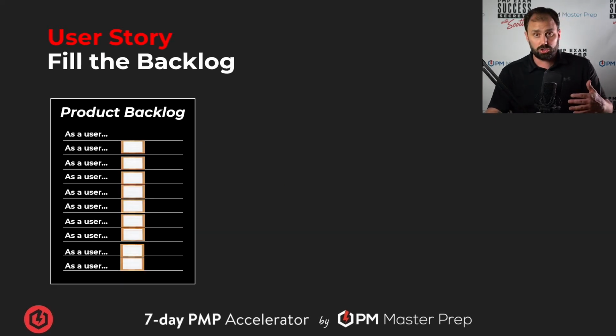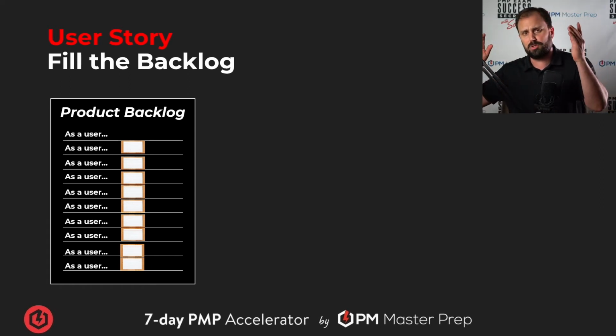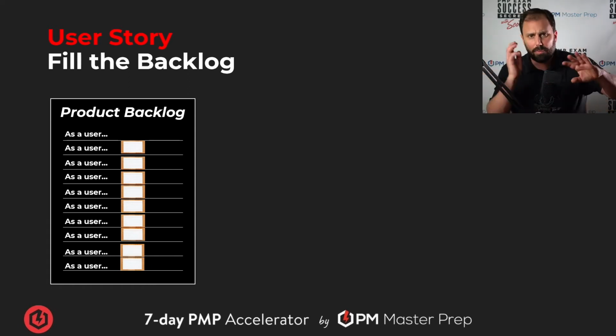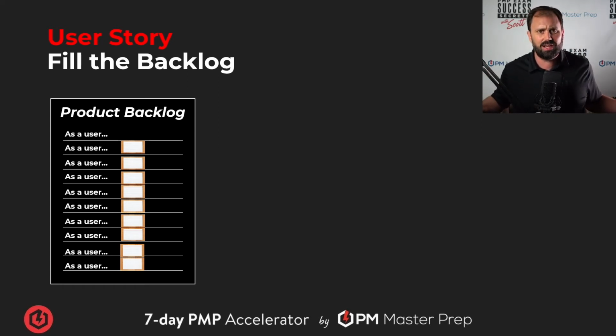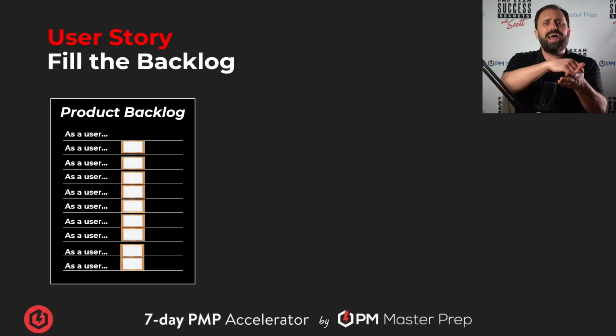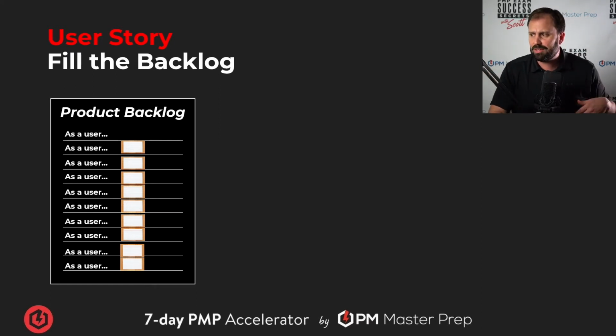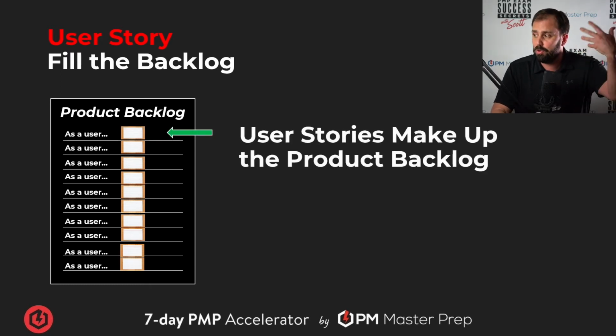Now, user stories, all these cards, these requirements, think about it. We're having this new system. COVID world's come. We've got to update our doctor's office so that we're compliant, making the customers feel safe and secure, and improving flow. How are we going to do it? You might have the office go around and get all these ideas. Ooh, we could. As a user, I want to be able to, blah, blah, blah, so that we start filling these things up. And where do they go? Product backlog, right? Boom, boom, boom. They make up the product backlog, all these cards.